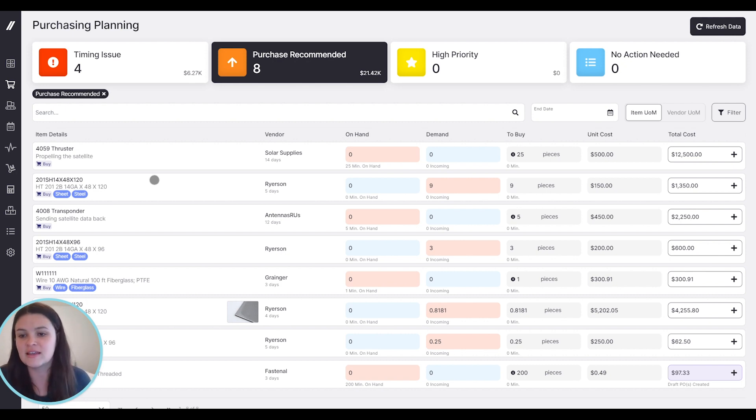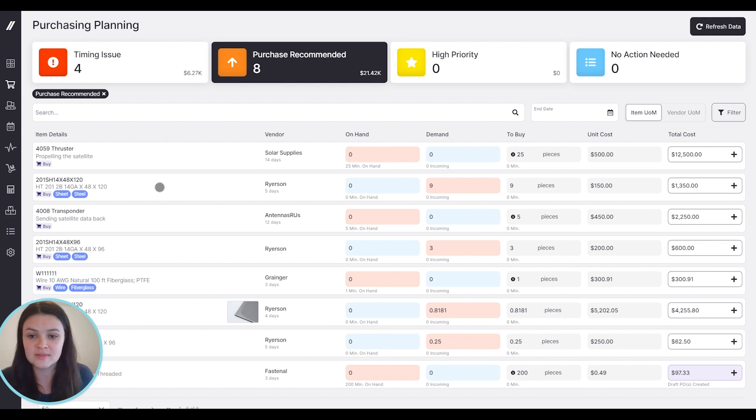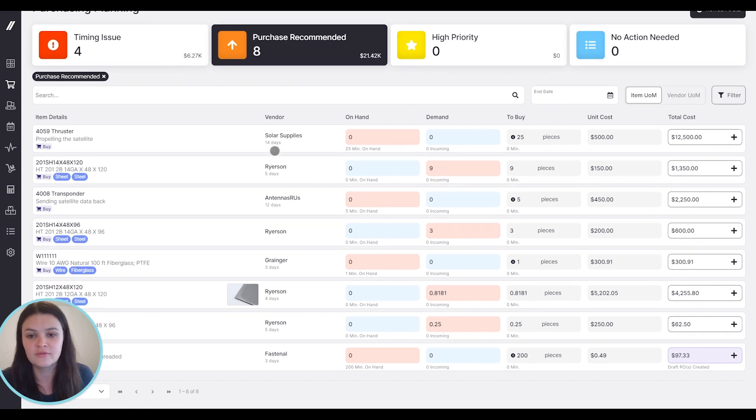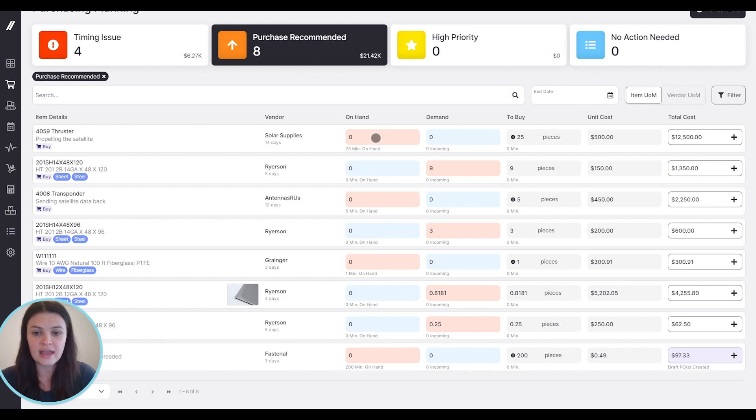So you can see that we have a list of items here. These are items that we purchase. We have the vendor associated with those items, as well as the lead time, 14 days in this case. We have any material on hand that we already have for this item. In this case, it's zero.